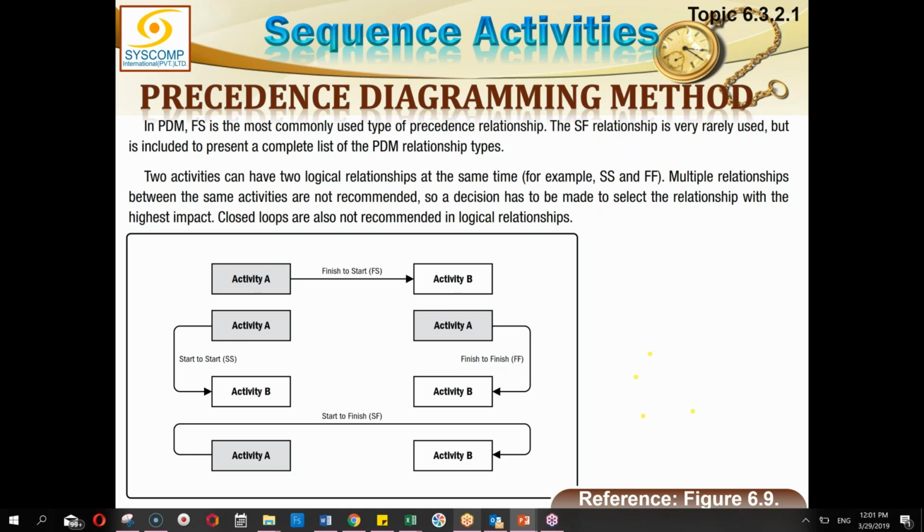I mean, you mean total if we are doing it in parallel? If somehow I'm doing start to start and both these activities start together, A activity takes 3 days, B activity takes 5 days. How much time will both activities take? 5 days. You see, you have reduced 3 days out of the sequence. 3 days in a project is a big thing, and just by changing the relationship between two activities, you gained 3 days. Now, can you imagine how much can you do in the whole of your project?